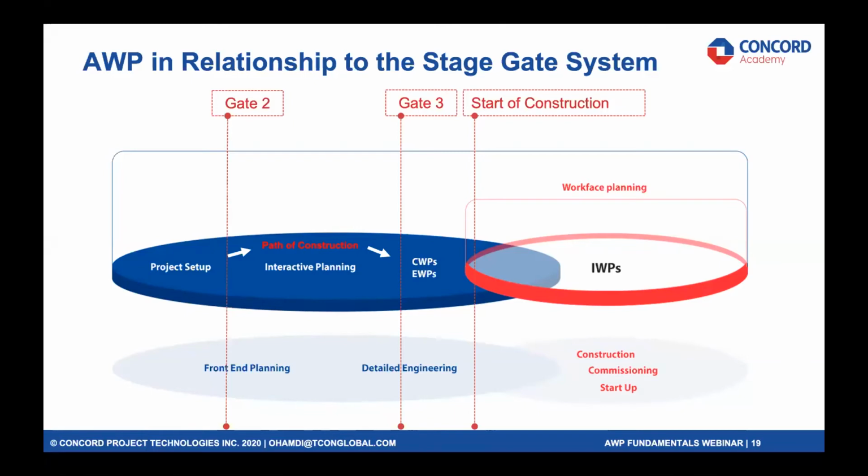Now, the process of developing the installation work packages, and these are the very small packages that we give to the crew, is called work phase planning. Maybe many of you have heard the terminology before. What is work phase planning? Well, work phase planning is, let's say, the early version of advanced work packaging. That's the process of creating those small packages into the field, managing them, and clearing the constraints, and helping the crew and the supervision have a more productive site.